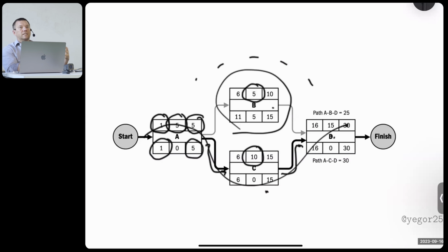This is the flexible path. I don't know what's the right name. The critical, or the opposite is the flexible or something. No, non-critical path. So the critical path is something which we cannot move. And this is the most important connection of activities in the project, because they actually define how long the project is. So the total duration of the project will be 5, 10, and 15.